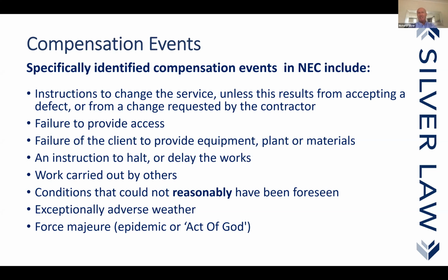Now I'm going to expand upon that slightly, in that we're not talking about just simply one program. We're talking at the very least a program every month. Because under this contract, we have an accepted program, and a revised program has to be issued at the dates stipulated in the contract data. And that is more often than not every month. But in addition to that, the contractor has to issue programs where progress on site is not following the current program, or when the project manager instructs him to, or when the contractor chooses to, or, and each and every time the contractor seeks to issue a compensation event quotation, that quotation he is saying is delaying the works should also include a program.